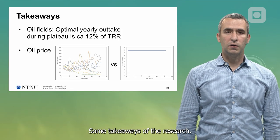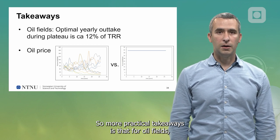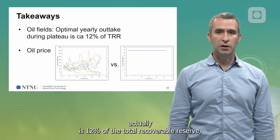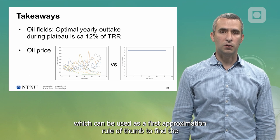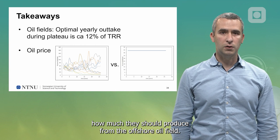Some takeaways of the research, some more practical takeaways, is that for oil fields, the optimal yearly outtake we found for many cases is actually 12% of the total recoverable reserve, which can be used as a first approximation rule of thumb to find how much I should produce from an offshore oil field.